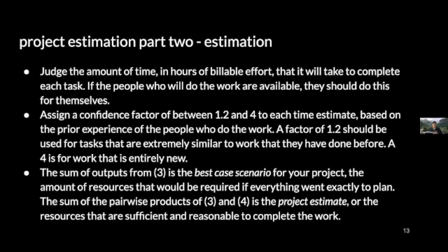At the point you hit 5, you should probably bring someone else in because I would consider that so far out of your current domain that it shouldn't be in your work breakdown structure anyway, because almost by definition, you cannot conceive of having achieved it. So now you'll uncover that column of the initial estimates and multiply pairwise the hours estimates by the scale factor. And that will give you a number in a third column.